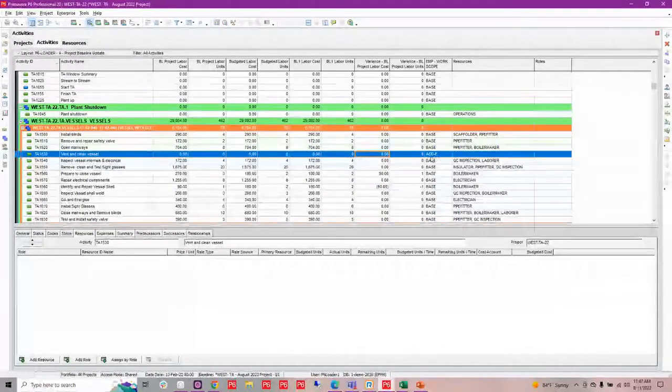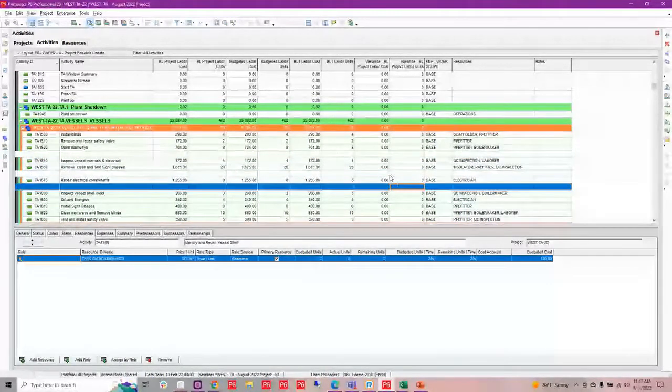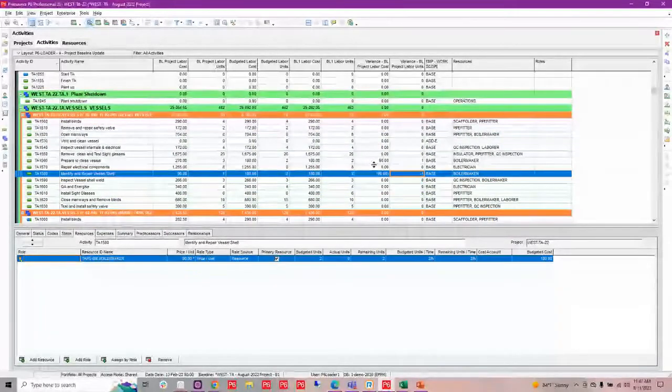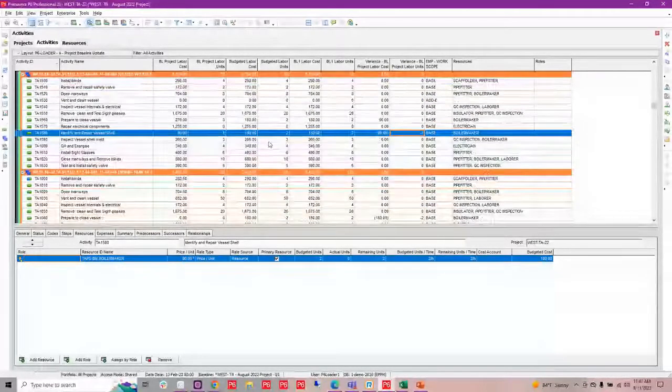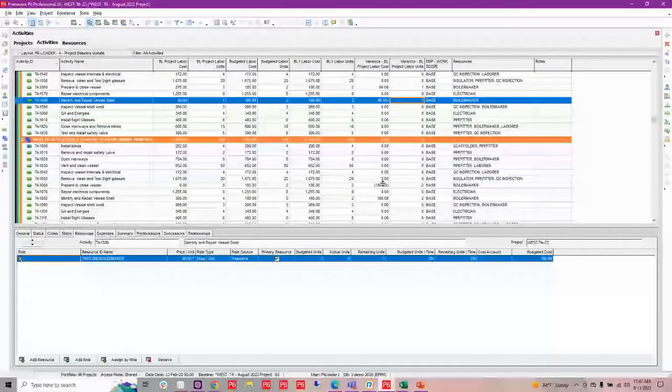I've got my scope that indicates that it was added. And I've also got my debits and my credits, and this does this every time. There we go. I've got my debits and credits for my 2 activities. And this is the difference, so that my baseline did change, and my debits and credits on my other one are now changed as well. So it's really easy to update those baselines without having to detach to make the changes and then reattach your baselines.